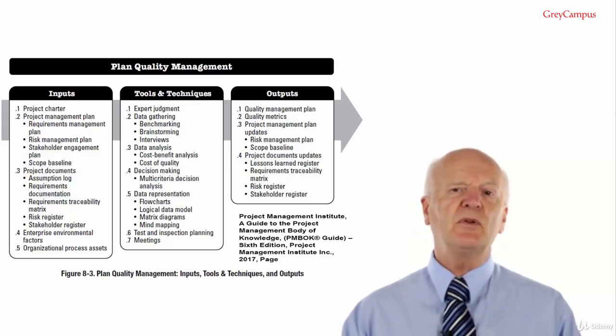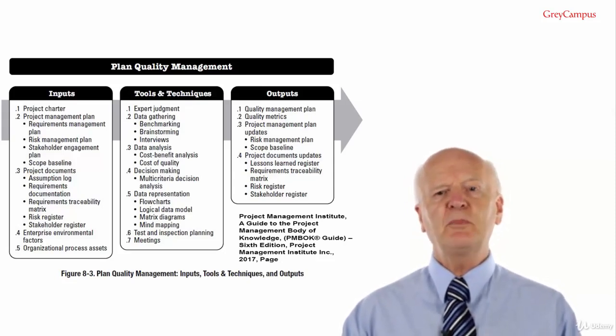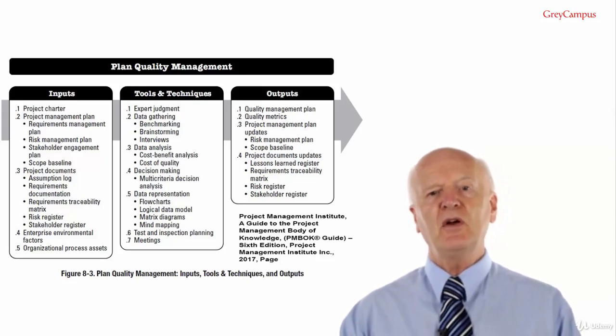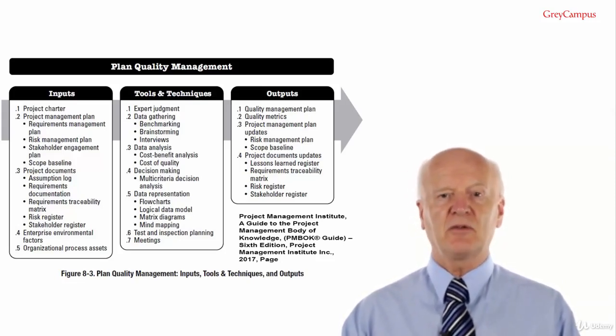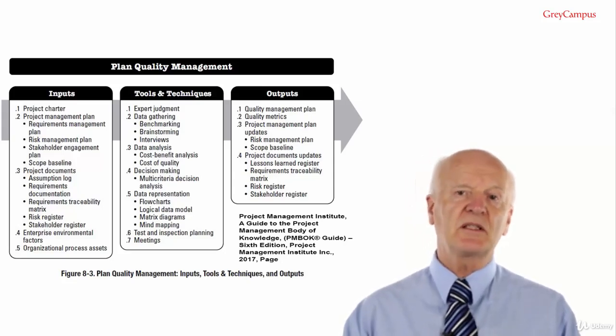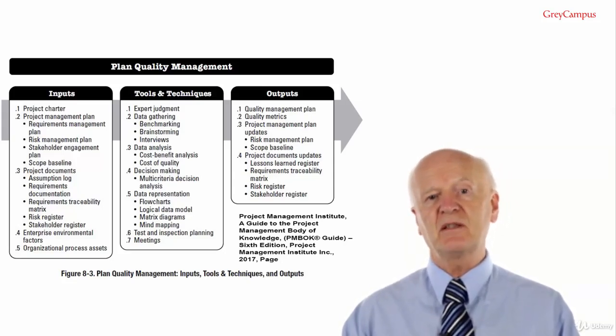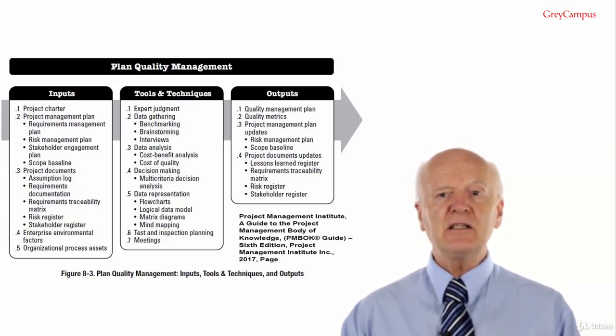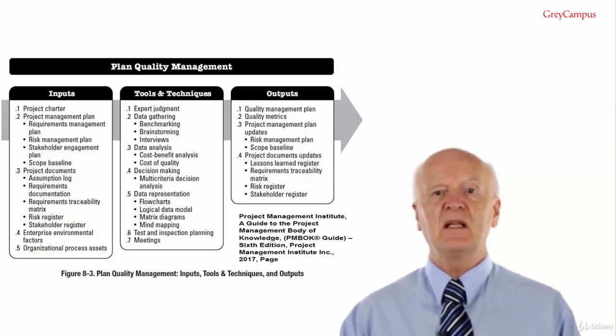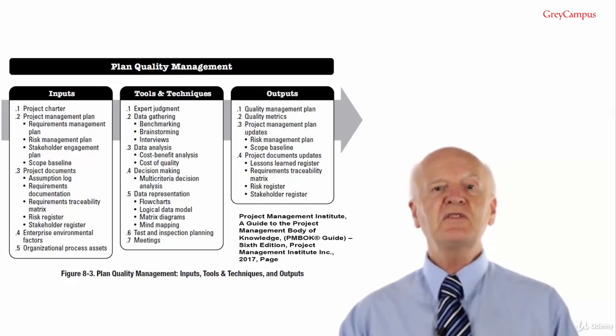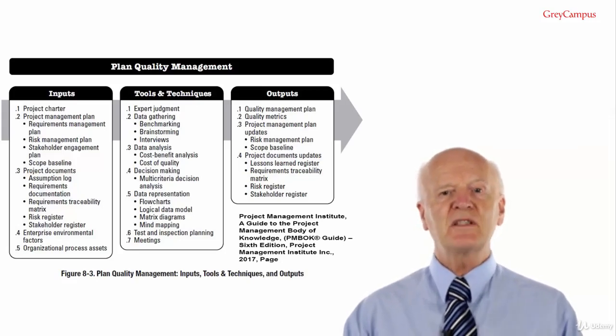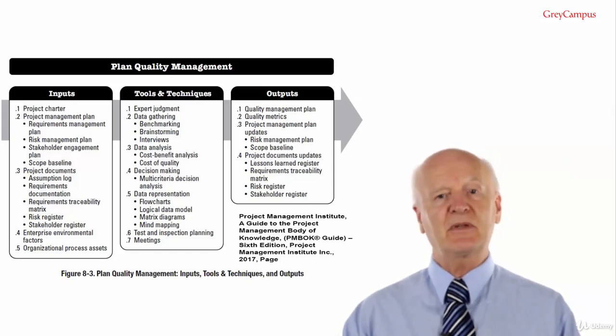Scope baseline. It's important to remember in the exam that a scope baseline is actually a group of 3 management products: the agreed scope, work breakdown structure baseline and the work breakdown structure dictionary baseline. In earlier versions of the PMBOK Guide, ending with the 2nd edition, which is called PMBOK 2000, a very futuristic sounding name at the time, these 3 products were considered separately.